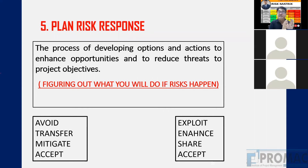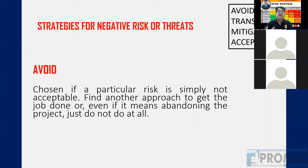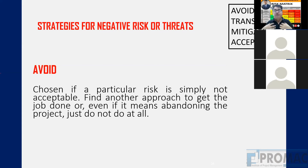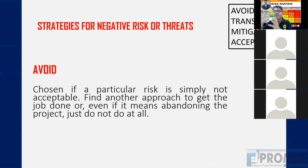Avoid means we will not handle the risk — we avoid it. Sometimes we may even drop certain project items because of this. For example, if I have purchased land in an area with a serious long-term water problem that cannot be solved, I may sell that plot and build elsewhere — that is avoiding the risk. Transfer means making somebody else responsible for the profit or loss of that risk, normally for a premium. Insurance, performance bonds, guarantees, warranties, and use of subcontractors all transfer risk. Government projects are typically done on a full contract basis specifically to transfer risk to the contractor.